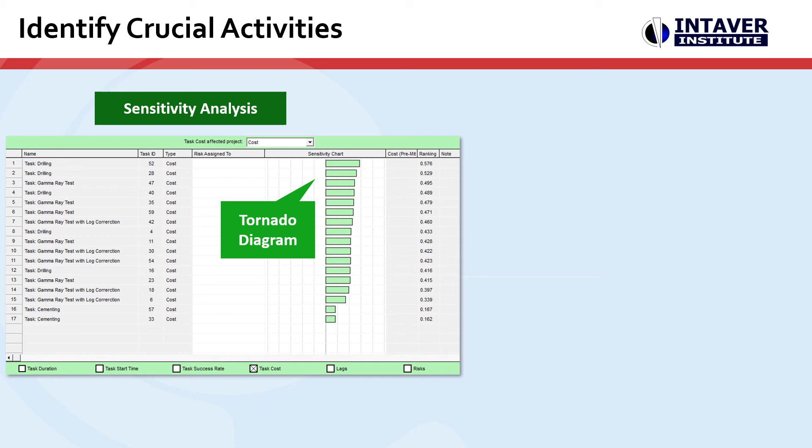First, we'll look at sensitivity analysis. The tornado diagram tells us which activities have the most impact on a particular project parameter, in this case cost.